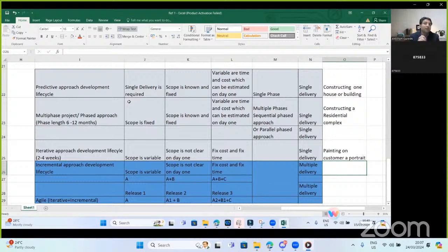So I will come to a random project manager in the organization, and I may ask them that I want to see your charter for this project, and I want to see your stakeholder register, and I want to see where is your issue log, where is your decision log, where is your risk register, what are your mitigation strategies? So I am asking the questions which are about the standards and the processes that should be used while managing a project. So that's a controlling role.